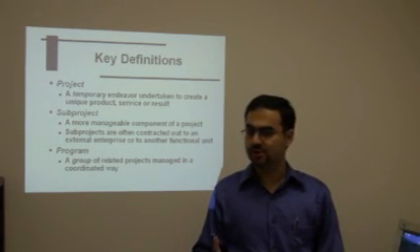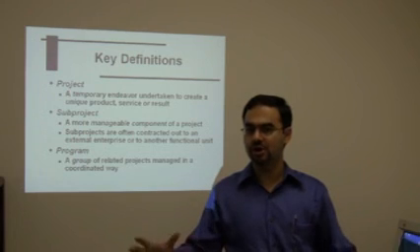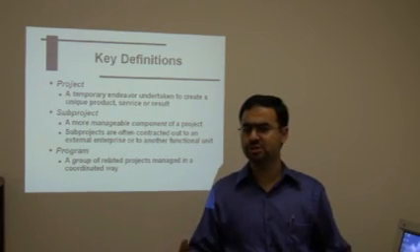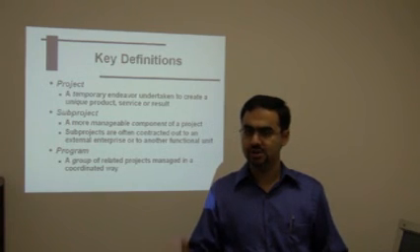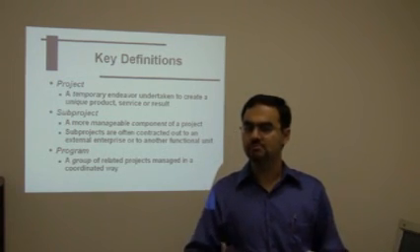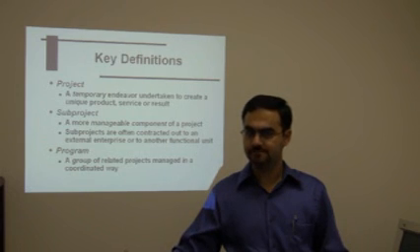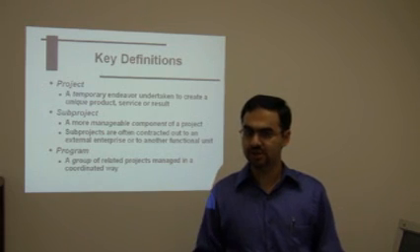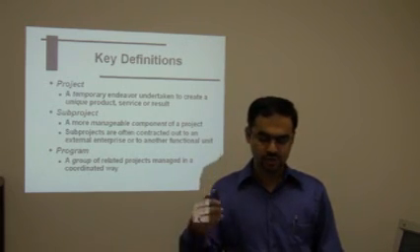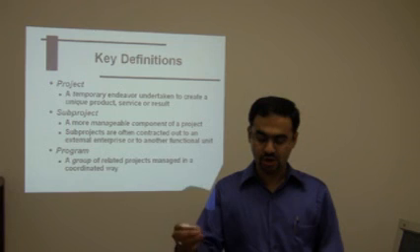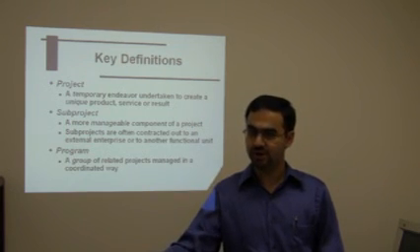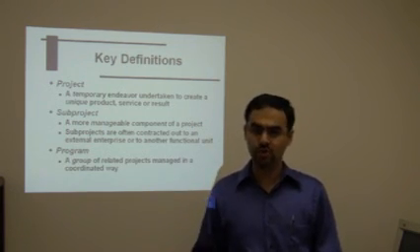Now, a project could be broken down into sub-projects. So if you have a large project, such as the creation of a new airline which is going to seat 600 passengers, that is a multi-year, multi-million-dollar project. You may want to break that down into sub-projects. Boeing or Airbus may need to break that down into sub-projects. So a sub-project is a more manageable component of a project. And sub-projects are sometimes contracted out to an external enterprise or to another unit within the organization.